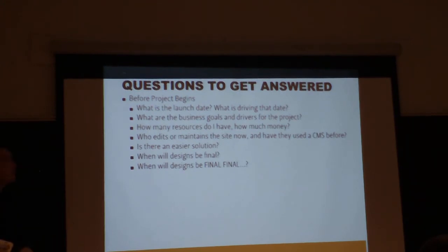What are the business goals? You need to know these as well, because you need to know why we are doing this project. Some requirements are going to come in, and you're going to be questioned. You can actually manage some of the scope yourself as a project manager if you know what the business goals and drivers are. You don't have to go back to your business leads to ask them whether something is really important or not. If you know all the goals, you can manage that a little bit better.